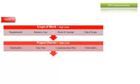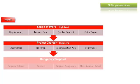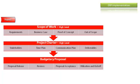Also in the Diagnostic phase, a high-level project charter is identified to know who the project stakeholders and decision makers are, to set the project plan for time and communication, and to define what the project deliverables are. This helps in setting customer expectations as well.